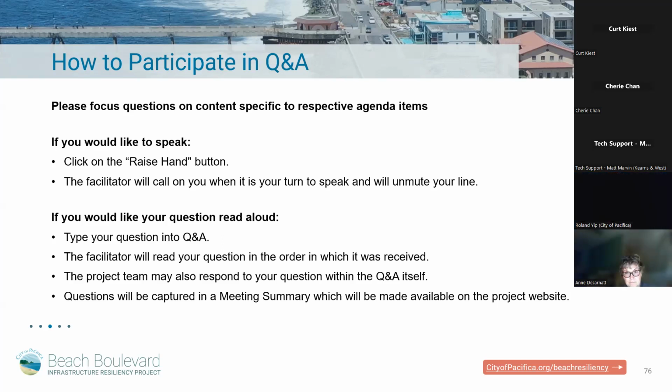That's correct. That has been shared before, that the construction cost currently is at $80 million. And there was a question in the Q&A. Someone looked up on the federal website about our BRIC grant that we are shortlisted for the construction for $15 million. So we're awaiting final approval before we announce that. But someone looked up and put it in the Q&A. So I'd like to share that as well, along with other grant opportunities we're looking for the next phases of the design.